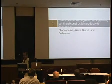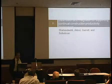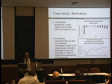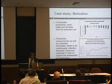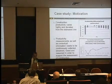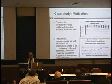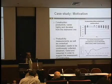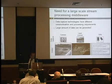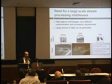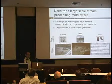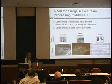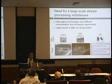Data fusion can also be used for continuous construction productivity assessment. Construction productivity varies highly and deviates from the baseline. Based on case studies observed, productivity measurements as well as contextual information need to be continually collected, streamed, and reasoned in order to support the assessment of construction productivity. However, dynamic capture technologies have different communication and processing requirements. The laser scanner, camera, and GPS, for instance, generate different amounts of data, and the processing requirements are different.